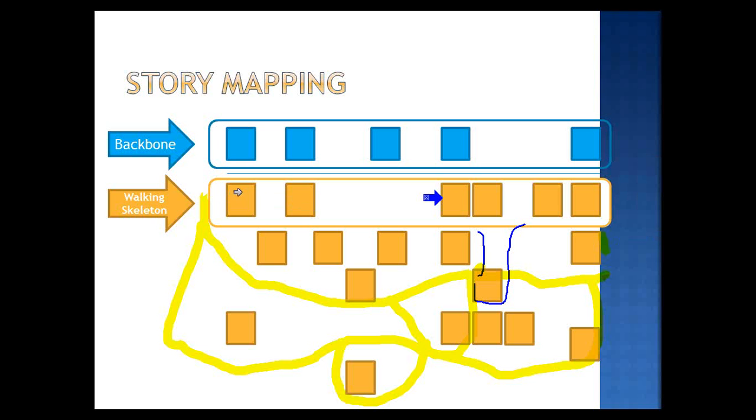So what I've seen some teams do is take this story and pull it off the wall, replace it with a placeholder, and then stick that into the product backlog when they're using a physical wall. So you can actually take it off, put it on the wall, it becomes a sticky. Then you see the story map.